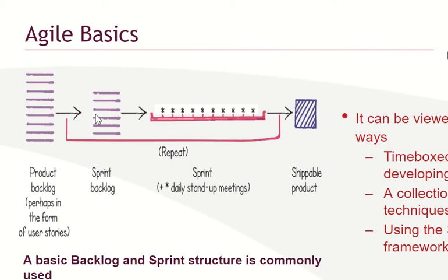So when you pick what you can achieve, in terms of the sprint backlog, it is picking what you can achieve within a time box, within a set of fixed time. For software, we'll always look at it in 2 weeks or maximum 4 weeks. Okay, what you can achieve. So you put what you want to achieve. For example, I want to create, in the case of a website, the home page